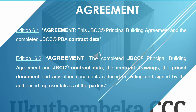Looking at the definition of agreement: Edition 6.1 read simply as 'this JBCC principal agreement and the completed JBCC PBA contract data.' Edition 6.2 reads as follows: 'the completed JBCC principal building agreement and JBCC contract data, the contract drawings, the price document, and any other documents reduced to writing and signed by the authorized representatives of the parties.' It is now quite longer and includes certain additional documentation by express reference.